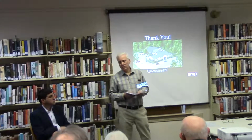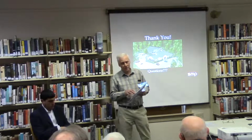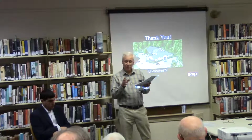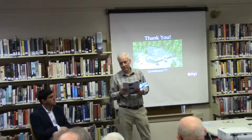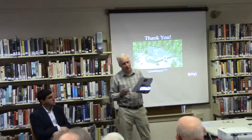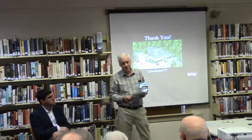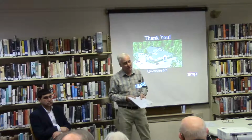The Northway Bank certainly seems to be the better option. In looking at between 5 and 10 years, I've done some rough calculations of 2.5 to 4 cents added to the tax rate. So that's what this project is going to wind up costing. Obviously a little less up front if we go 10 years, but 5 years is a pretty short term, and we can get this thing paid off fairly quickly that way.